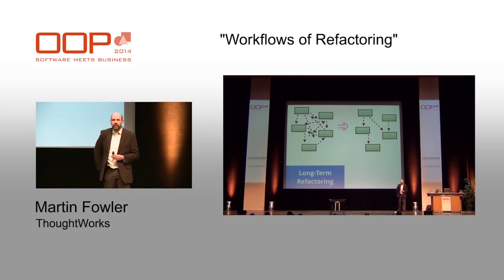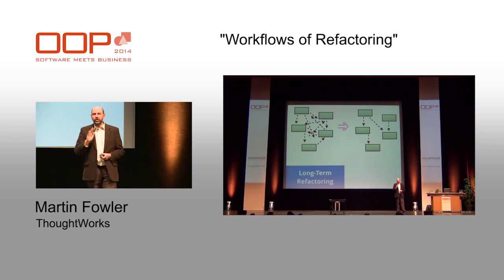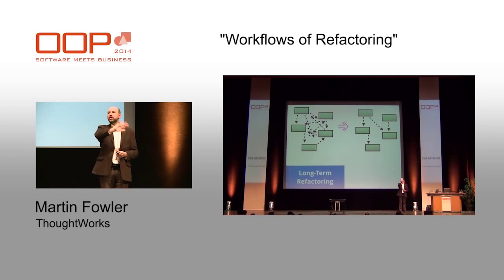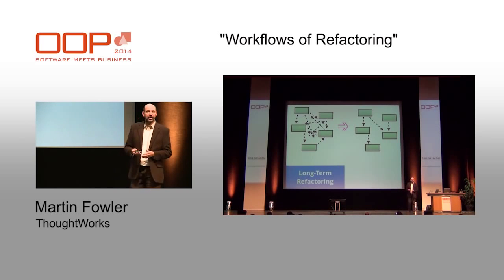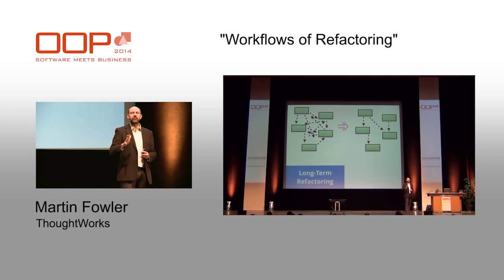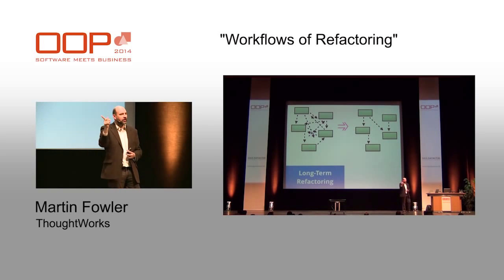My advice here is really very much using the workflows I talked about earlier on, and preferably not the planned refactoring workflow. What you need to do is get some vision of where you'd like your code base to be. I've seen this done in a session. The team might spend an hour or two in a design meeting saying, this is how we'd like things to be in the future. This is our long-term goal. But rather than set up some tasks in your plan to get to that goal, you say, okay, from now on, every time you're working through this area of the code base, refactor it a little bit to get it a touch closer to that goal.